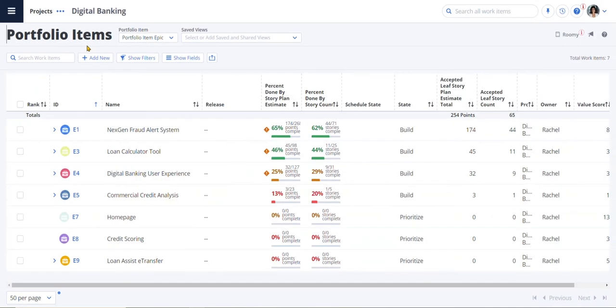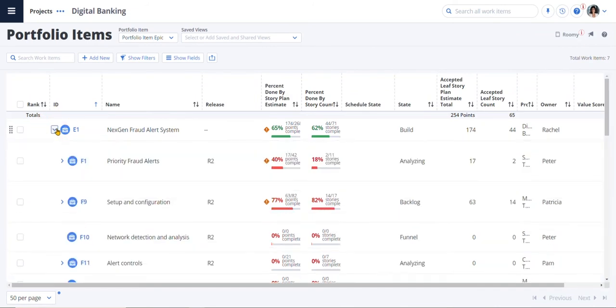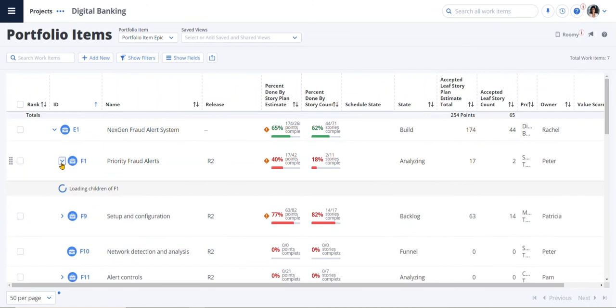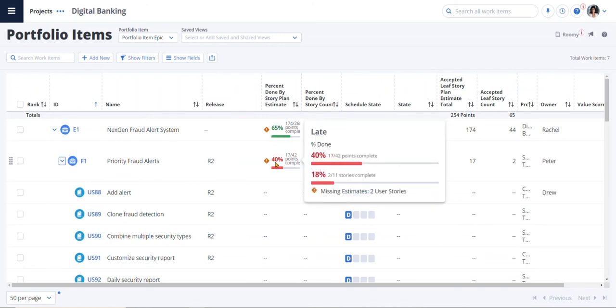Here, Patrick can see that the epic next-gen fraud alert system has been decomposed into features and stories for capacity planning and analysis. Patrick can also see the progress of these work items. The feature, Priority Fraud Alerts, is 40% done with quite a way to go. The progress data is rolled up from multiple trains or programs for enterprise visibility.